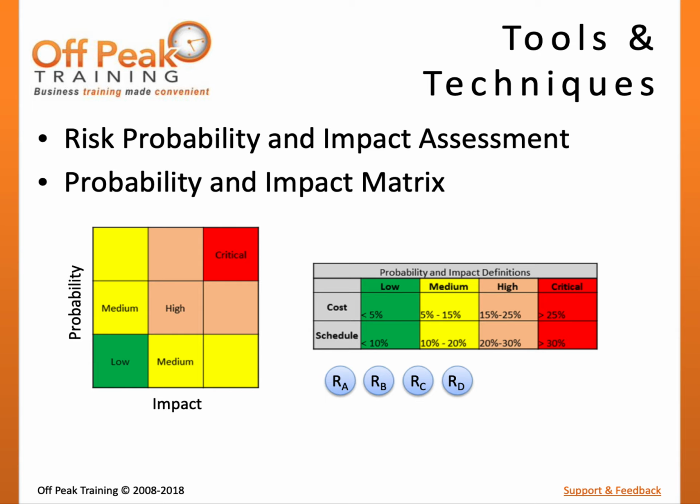Impact assessment focuses on understanding what effect the risk event will have to a project objective if the risk occurs. Since the team may not have conducted intense analysis at this point, the result can be very subjective, such as high, medium, or low. More risk categories can be used if a greater level of detail is required.